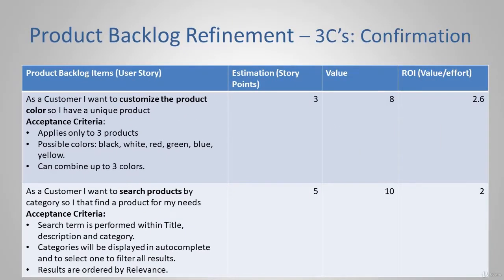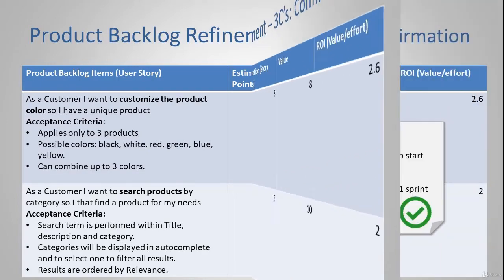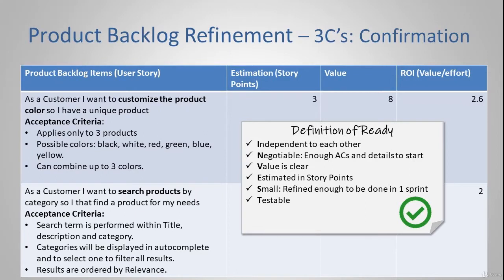The Scrum team continued to discuss the most important user stories, and as a result of the discussion, they write the acceptance criteria, which is basically what they agreed to do and complete for each user story. The team knows and accepts that they don't know all the possible details right now. They accept that some details will emerge during the sprint and the development, and they will need to clarify them with the product owner. But at this point, they just want information about the stories that is good enough so they can start working.